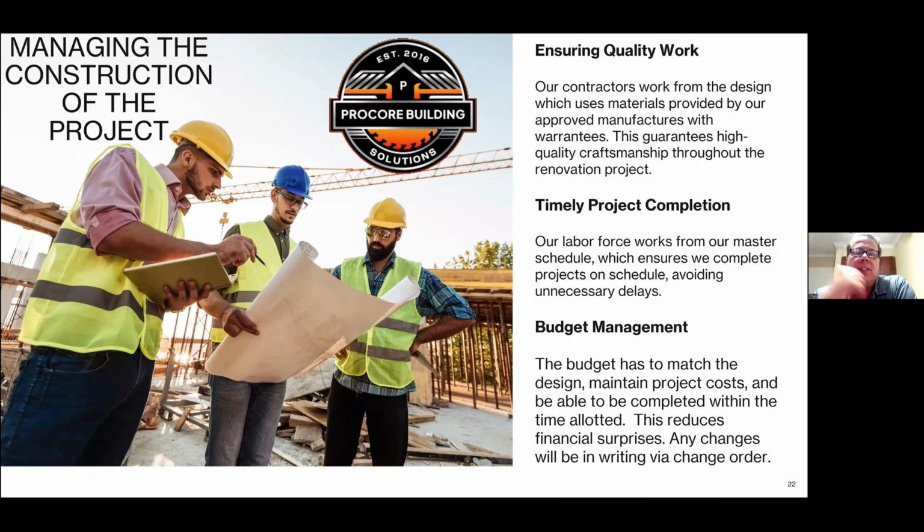One of the biggest challenges our competitors have is ensuring the quality of the work, the timely project completion, and the budget management. When we do the design and present it to yourself and to your lister, the seller, everything is there, so they have 100% of the information to make the decision. If they need to change something, if they want something else added, we'll do a full change order, which describes the change in the scope, the change in the price, and the change in the timeline to complete.